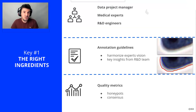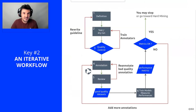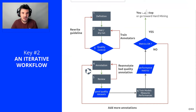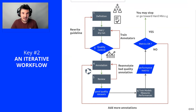Now that we have seen the ingredients, let's see the recipe. We have set up a very simple organization that allows us to quickly find problems in the project framework and iterate to improve it. It starts with a pre-project — steps one, two, and three in this flowchart — which is very important. We start with the definition: we write our guidelines for the current project, explaining the annotation of the classes, the edge cases, etc.